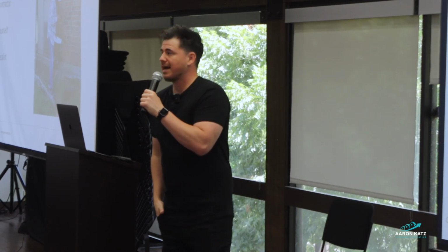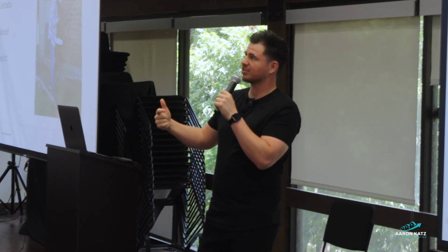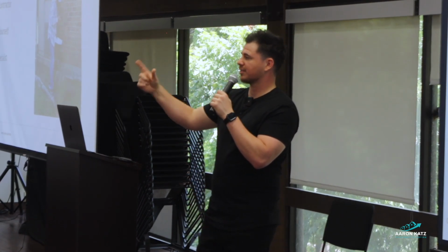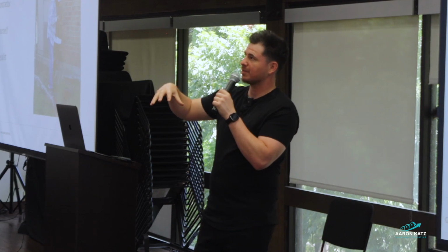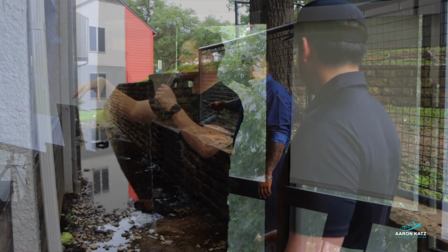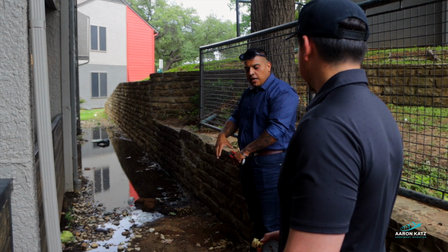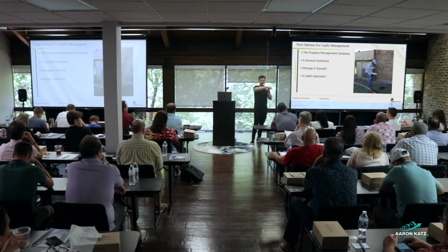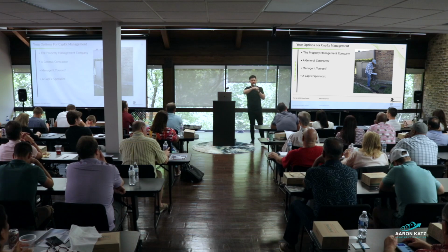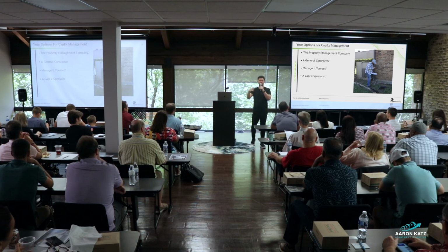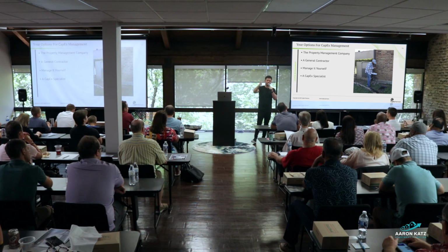And so a couple of things happen when big projects start happening. There's no oversight. That's the first thing that happens. The property manager gets busy, or the assistant manager, and they're not going out to the project and actually checking on it. They're not checking on what type of materials, does it match the contract. They're not checking on where they're storing materials. Did the tenants get notice? It just goes on and on.